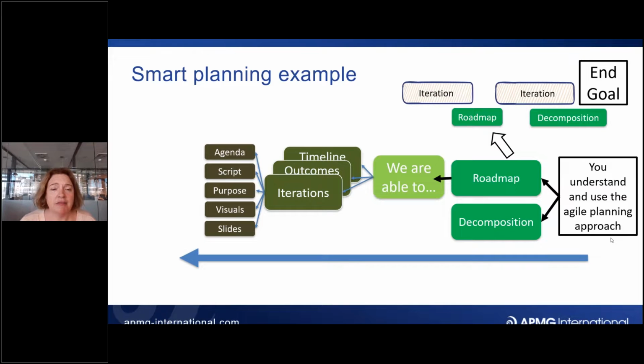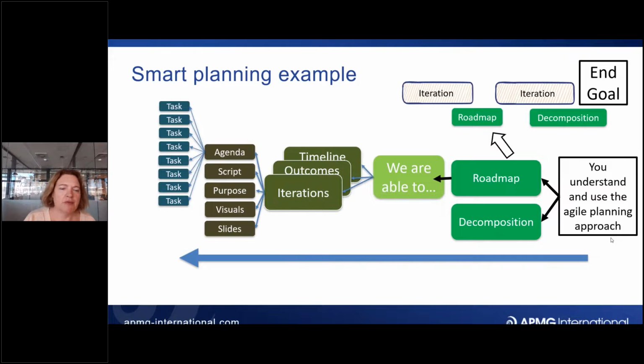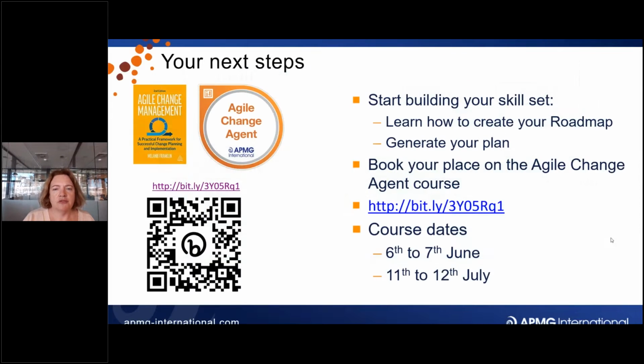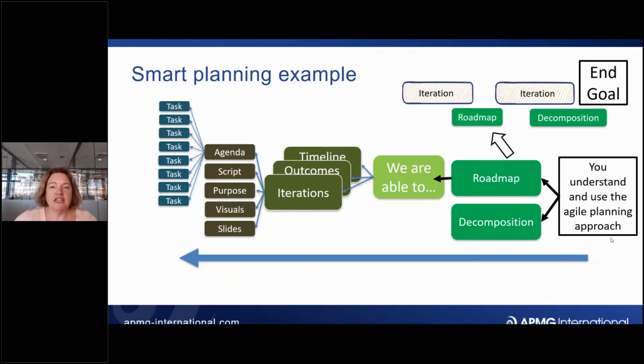In 28 minutes, I can make 2 points. And then I wrote a script. Believe it or not, I have actually rehearsed this. I've worked it all out. The key points I want to share with you, that will make the difference. And that is what I put in the plan to begin with. So if you think about it, I think about all the tasks to write the agenda, the script, the purpose, the visuals, and I put them into the first iteration.